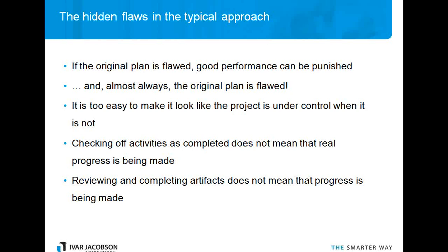So other problems are that checking off activities as completed doesn't mean that real progress is being made. In other words, it just says that the activities you said you were going to do, you've done. It doesn't mean that they're the right activities or that you're actually progressing toward the real solution. And similarly, reviewing and completing artifacts doesn't mean progress is being made, because just because you have a requirements document and have it signed off doesn't mean that those are all the requirements, nor does it usually mean that the requirements are correct. So there's a big problem getting people to actually pay attention at a sufficient level of detail in order to really give good feedback on those kinds of documents.